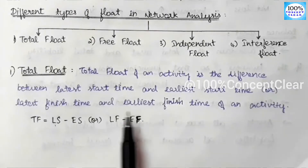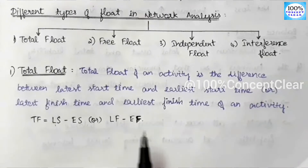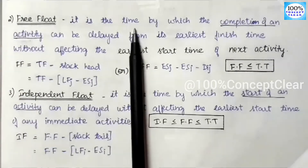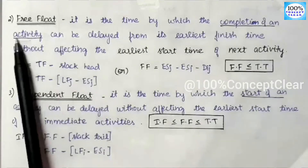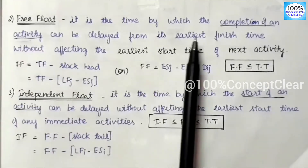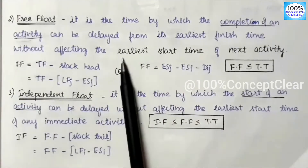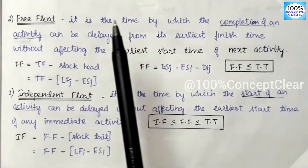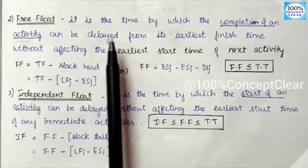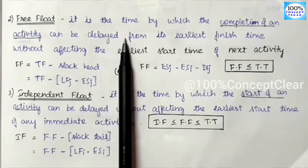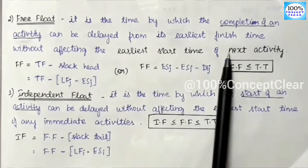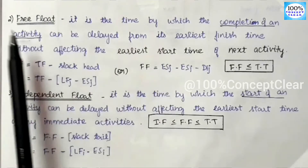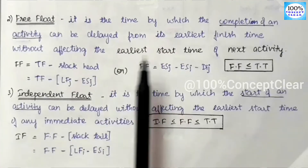The second type of float is Free Float. It is the time by which the completion of an activity can be delayed from its earliest finish time without affecting the earliest start time of the next activity.